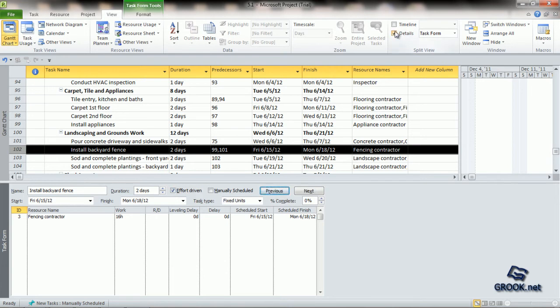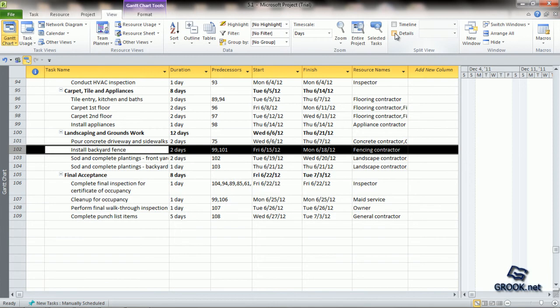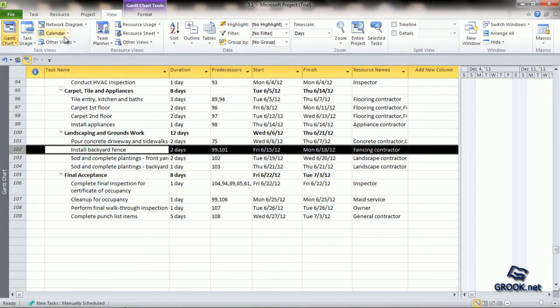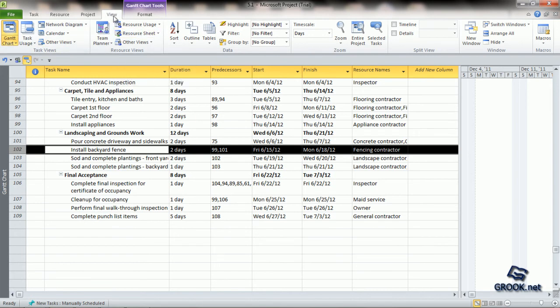To turn off the Detail View, we can simply uncheck this box. Now we will add an additional resource. For that, we can leave the Gantt Chart View and go to the Resource Sheet View from the View tab and Resources View sub-tab.